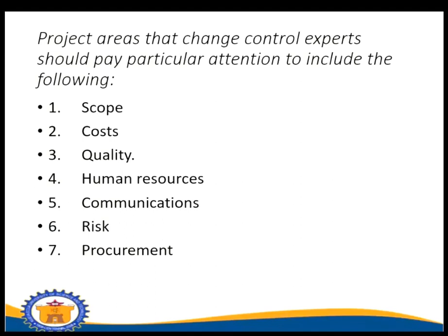Next is cost. Change requests must be evaluated to determine how they will affect project cost. Labor is typically the largest expense on the project, so overages on completing project tasks can quickly drive changes to the project cost.